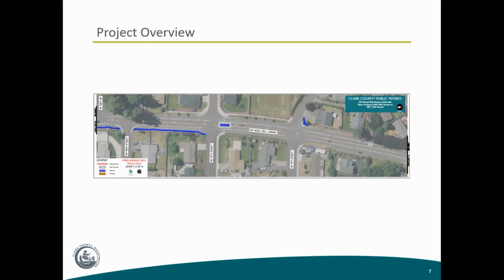I'll take the last question. So there will be no full road closures as part of this project. There could be isolated lane closures that will be controlled by flaggers, but nothing that's going to be a permanent closure for an extended amount of time. It would strictly be on a case by case basis and short durations.